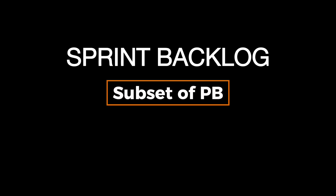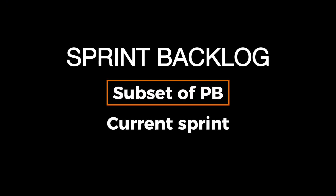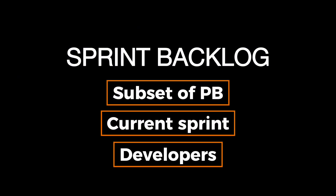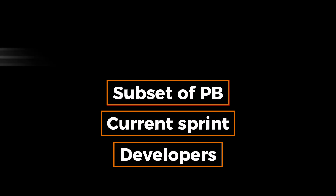Next is the Sprint Backlog. This is a subset of the Product Backlog selected for the current Sprint, along with a plan for delivering the increment. The Sprint Backlog is owned by the developers and it's updated throughout the Sprint as more is learned.